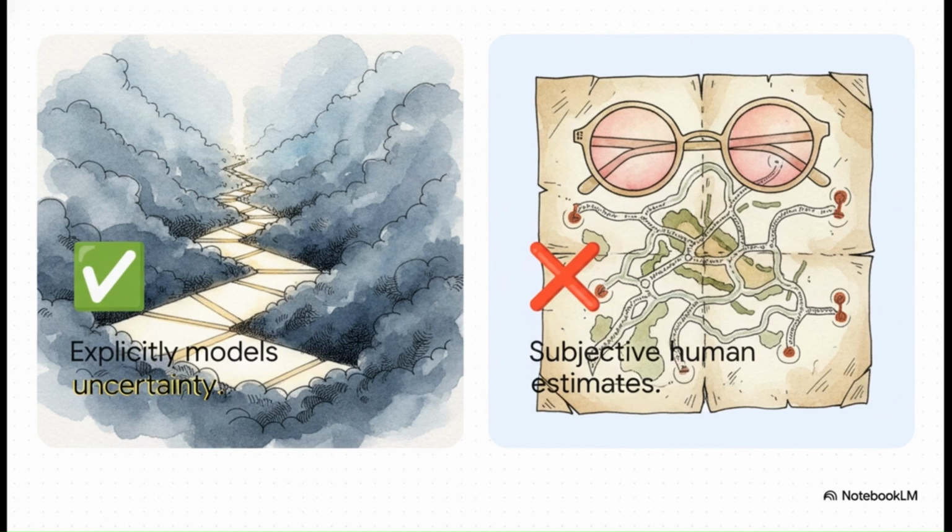Also, the math typically only sums up variance on the critical path, which creates what's known as merge event bias. Basically, you might accidentally ignore near critical paths that could suddenly become critical, which means you might actually be understating the true risk of the project.